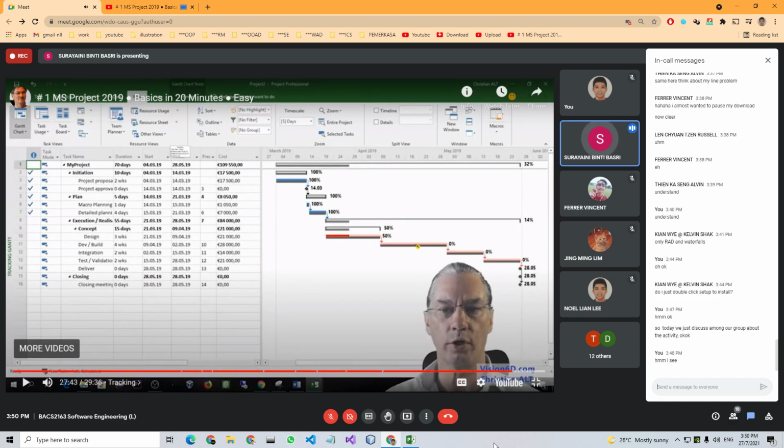Okay, so for RAD, like I said just now, maybe you will separate your project based on your module first, and then after that, under the module, there will be the stages for each of the modules.